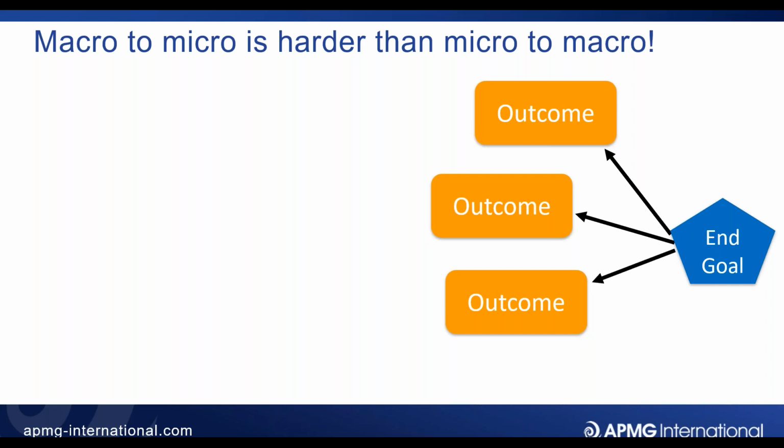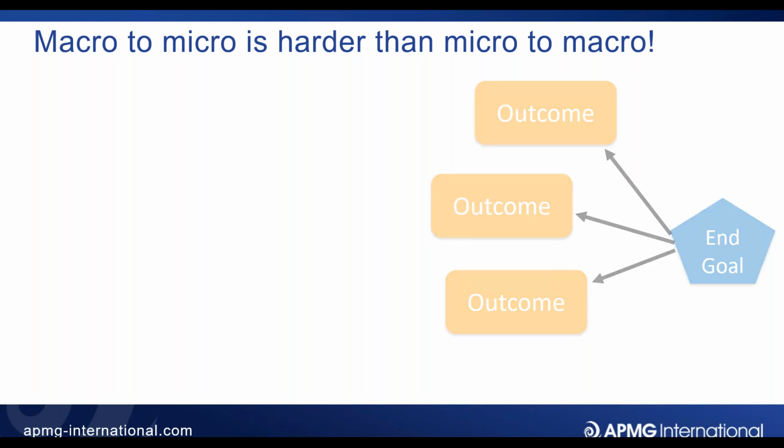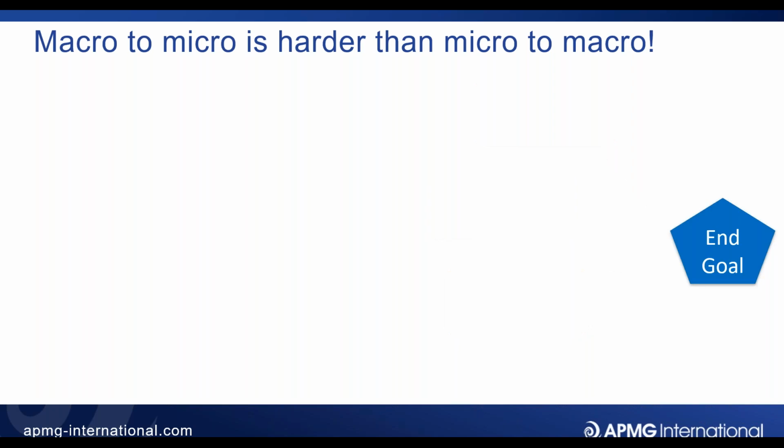I know I've given you a very simple example, but you can see the value in picking those outcomes. But the key skill is being able to take people into that space that says, okay, what's this ideal macro picture, rather than ending up with an accidental end goal. The accident is that it's a product of having added together all of the little ideas, but it wasn't a deliberate decision. Therefore, it might not be quite the right decision. It might not add quite the right value. I think that's a really important piece. And if you can get that first level of breakdown done, then this next level of breakdown makes more sense.